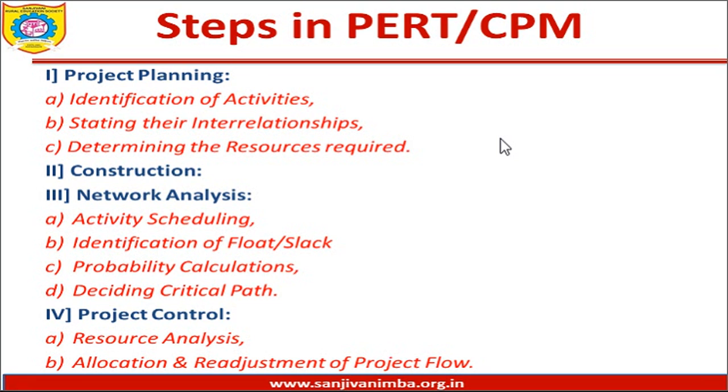So friends, I will just take an example so that you will be in a position to understand. For example, if somebody wanted to start a company for which he has to raise funds from the share market. Now, the first thing, he will have to plan the entire project, that is enactment of an IPO. To come up with an IPO, that is initial public offer, there is a complex process which involves a number of activities. So in the planning, the first thing that you will have to do is identify the number of activities that are involved in the process of coming up with an IPO.